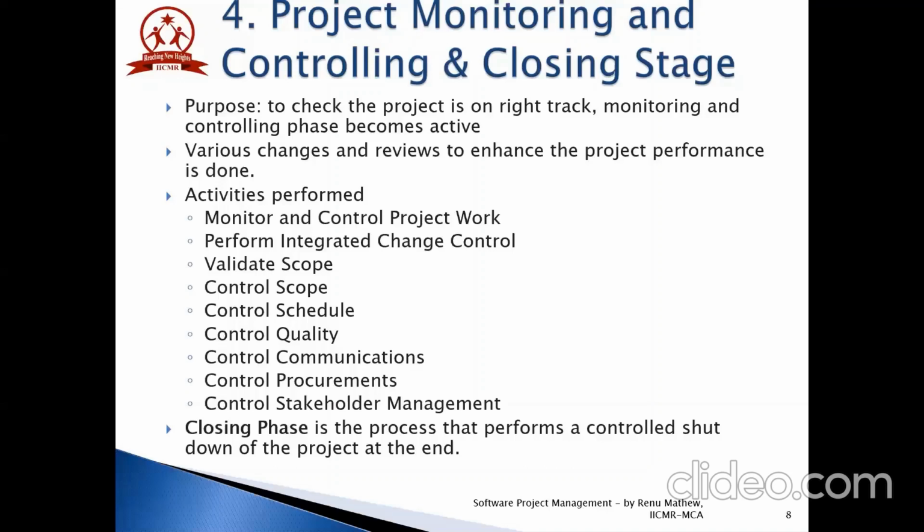Control schedule process helps you to capture current schedule status, determine the variance from the schedule baseline, understand the nature of the variance, and respond by taking appropriate action. If changes are needed to the schedule, then they must go through the change control process. The change should be re-evaluated and only then it should be used to update the schedule baseline.